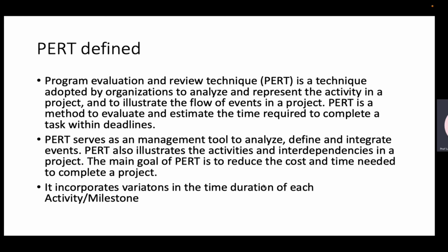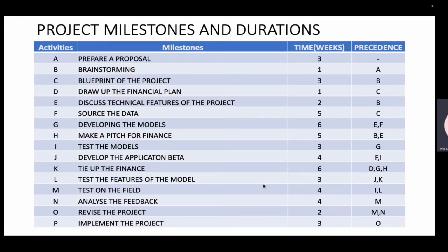The only thing is, for each activity, this is the thing for a PERT. So you had the most likely time. You assumed that these don't change. But strictly in reality, this is not much in your control. So when you do PERT, you give the most likely time, an optimistic time, and a pessimistic time. The most likely is written as M, most optimistic is A, and most pessimistic is B.